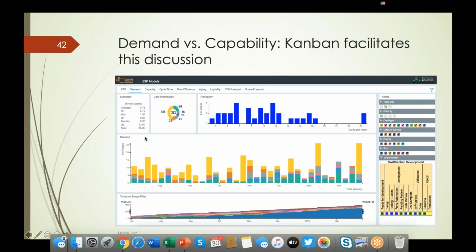So the best thing I can say is that you start with what you do today. If you do have different leaders in the organization providing different levels of detail or different types of input, you might think about having individual boards to help each of those leaders themselves understand what their flow is, and therefore have multiple of these upstream boards.